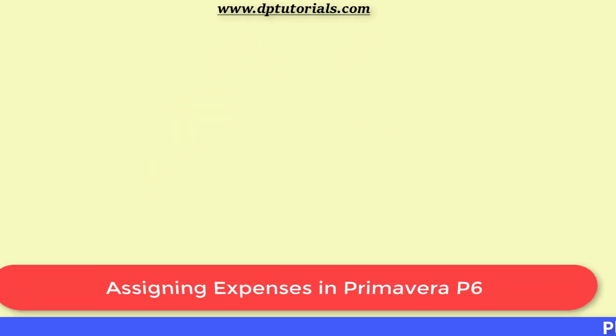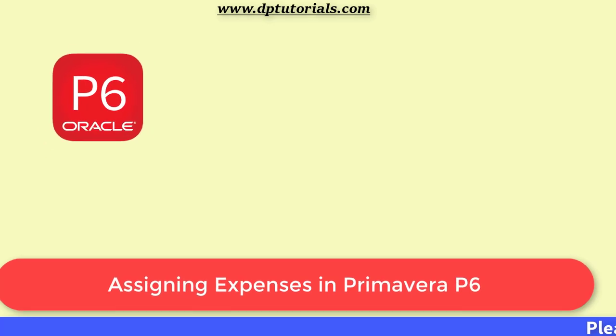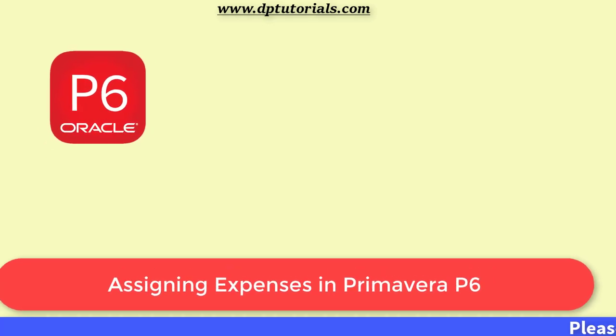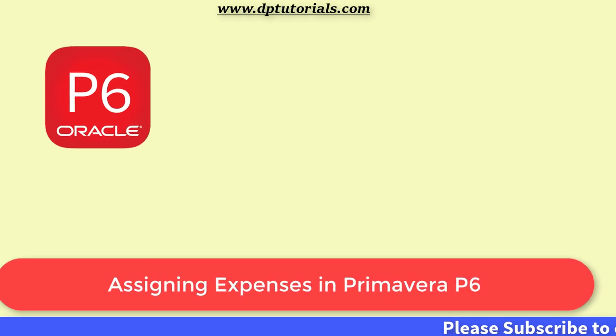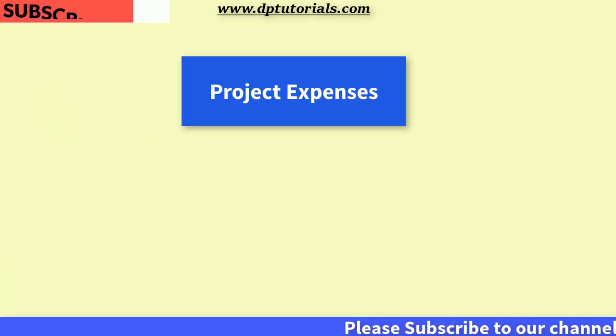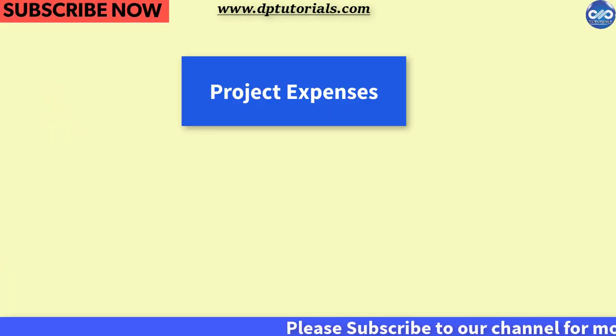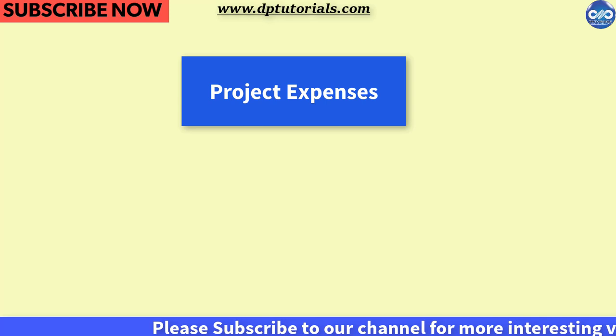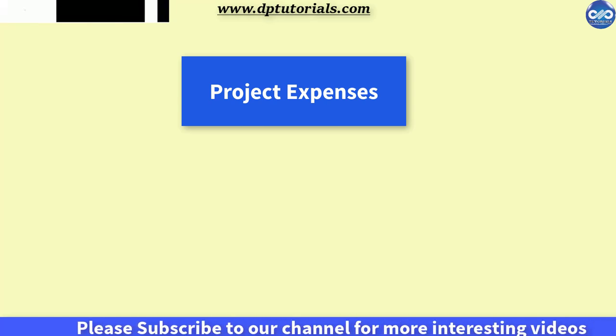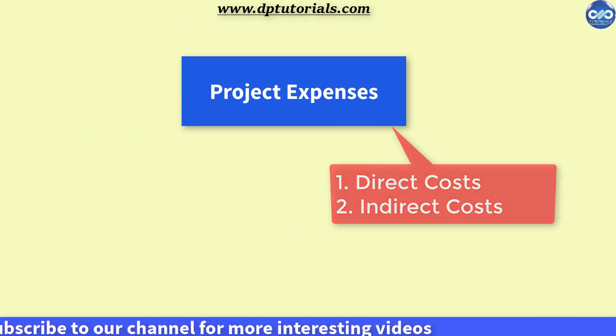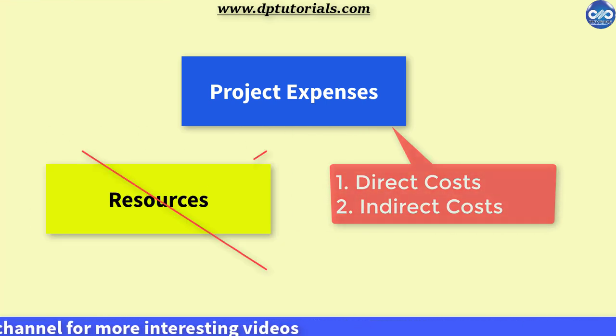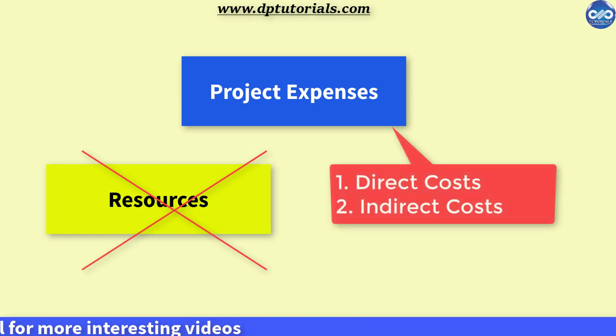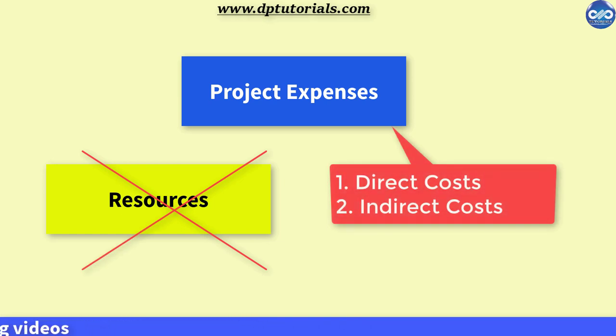Hello friends, welcome to dbtutorials. In this tutorial, let us learn about how to assign expenses in Primavera P6. Tracking of project expenses is very critical in any project. The best part with this tool is that we can assign expenses without assigning resources. Now let me show you how to assign expenses with a sample project.